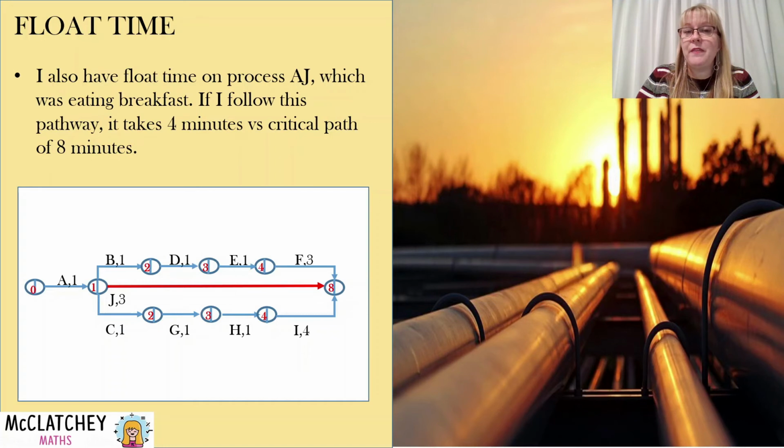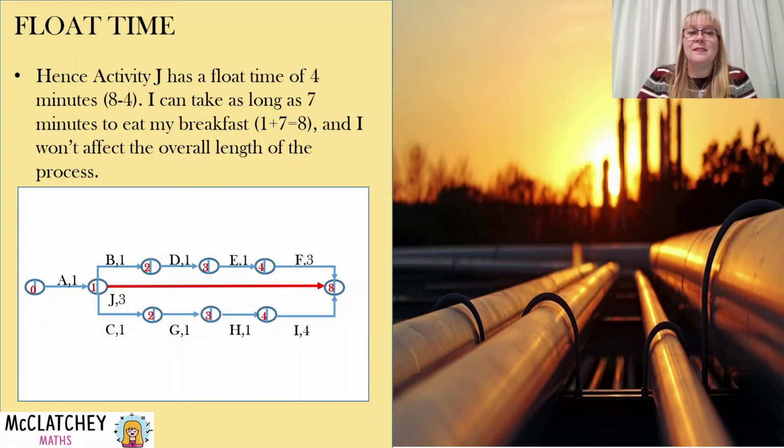Once again, also with that middle process, AJ, where I was eating breakfast, in that case, it only takes 4 minutes to eat the breakfast from beginning to end. So that means I've got 4 minutes up my sleeve. I can really take my time and savor that croissant or whatever it is that I'm eating. So I've got 4 minutes of float time on that middle pathway. So that won't affect the process if I took an extra 3 minutes to eat breakfast and took 6 minutes altogether for activity J, I am still going to finish the whole process on time, which is my objective.